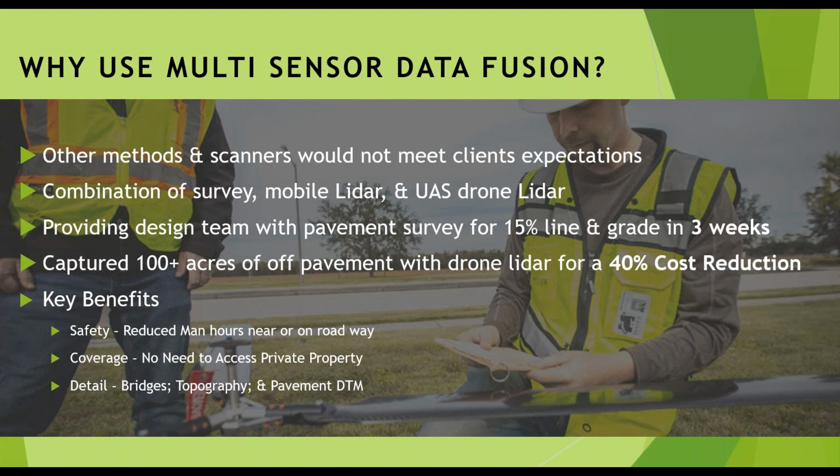We were actually able to do this. Not only did we complete the data and deliver within 3 weeks, we were able to do it at a 40% cost reduction from traditional methods. Some of the key benefits were safety. It reduced man hours near or on the roadway. One of the things we did not need to do on this expressway was close the lanes. We never closed the roads, we never blocked off a lane, and we never needed to physically access the road surface outside of driving the mobile LIDAR on it.